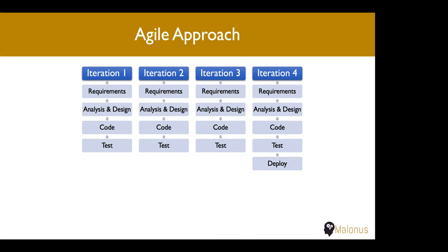Apart from that idea of getting feedback faster from the customer, this idea helps in dividing the risk as well, because the delta is small now. Instead of a delta of 6 months, you may be shaping the features in 2 weeks, creating things end to end.